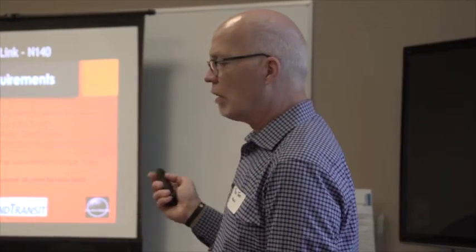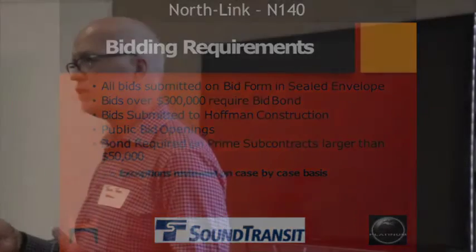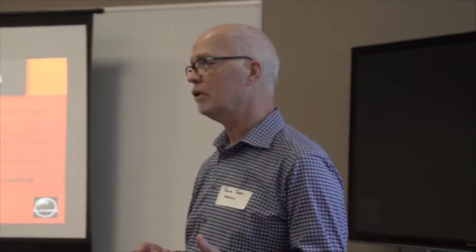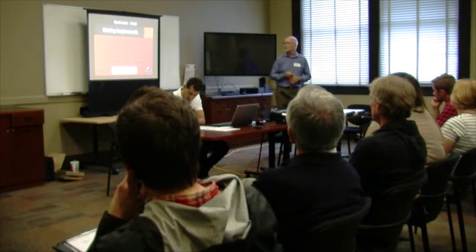The bids that are over $300,000 by state law must be accompanied by a bid bond. A bid bond is something you're going to want to order in advance. It's not something you can usually get in 12 or 14 hours. Unless you've got a really good relationship with your bonding company, it's going to take a little time. So make sure you pay attention to that.